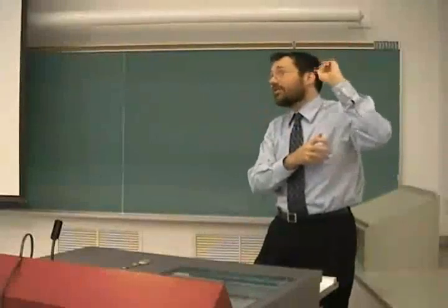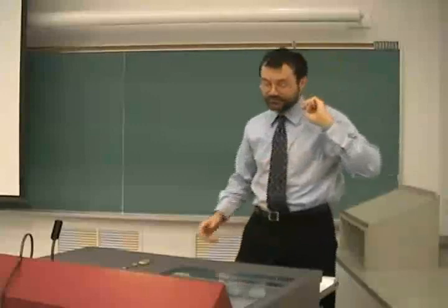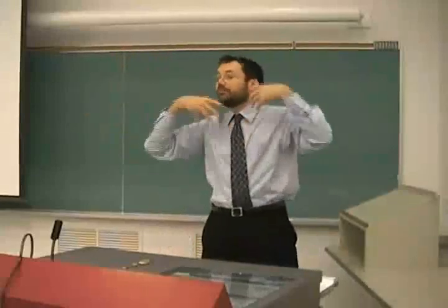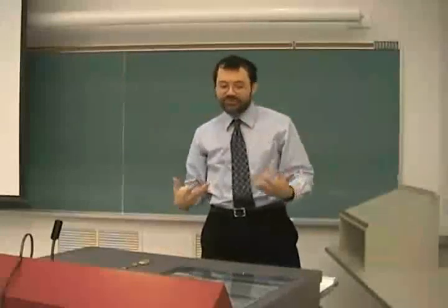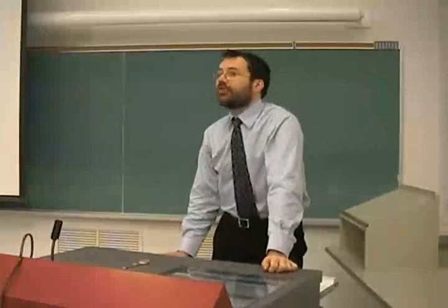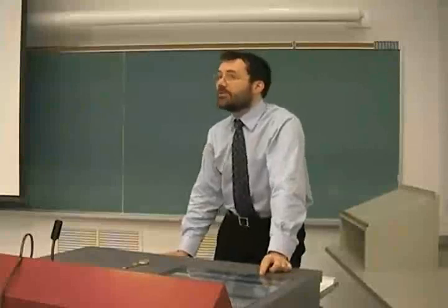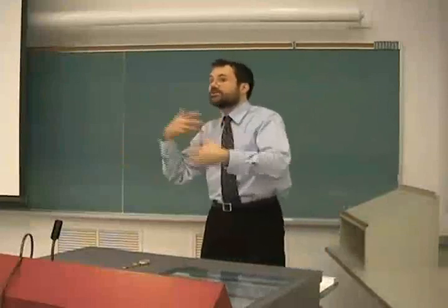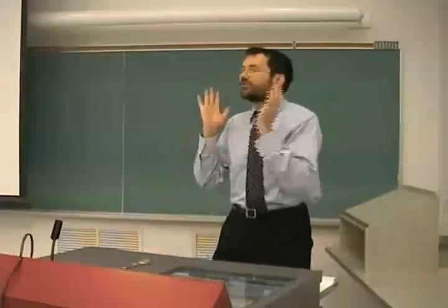That's typically the thing that first comes to their mind. You have quality statistics published so everybody can see them. Everybody knows how the system is shaping up. And you have competent project management where people really understand the time. They're doing risk management. They're adjusting the project plan as needed as the deadlines approach, so you don't run into this crunch where you have to chop testing off.